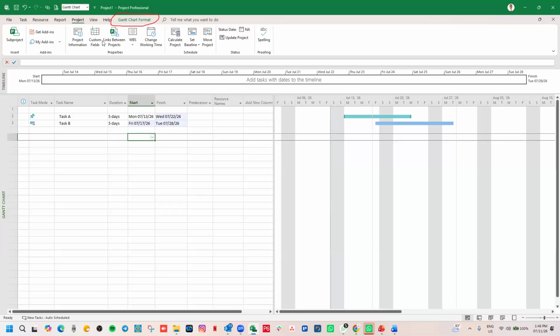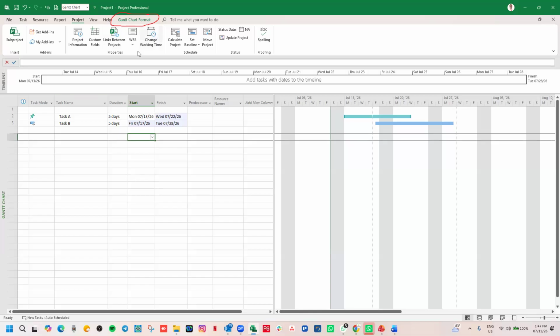And because of what we have just done, see the scheduling is starting from next week, Friday, for the auto schedule. So all the scheduling that you are doing, if it is automatic, it will start from here, next Friday. That's when it will start from. Manual, you need to state it yourself because you entered it manually. All right, so that is what we have here. Any question?